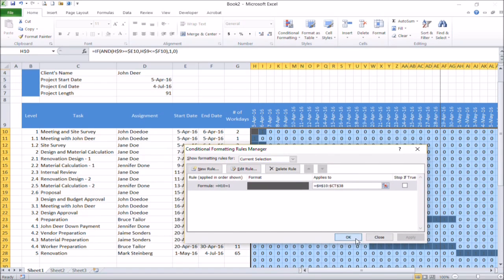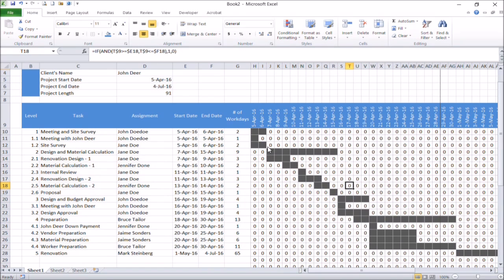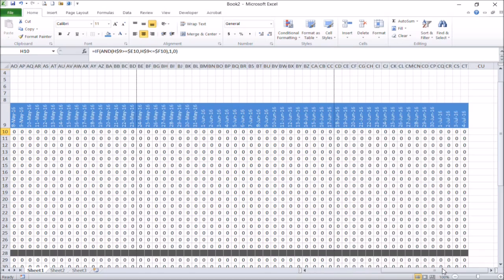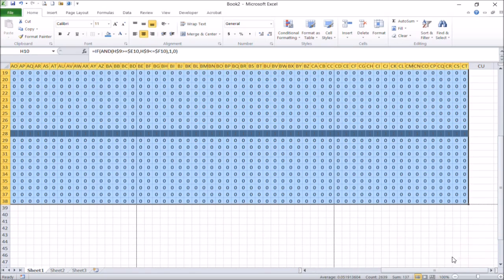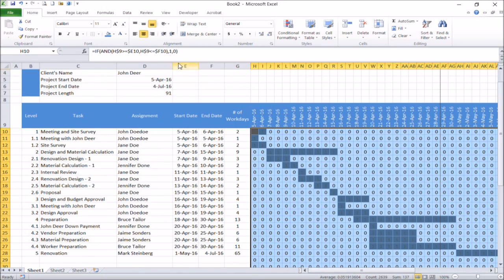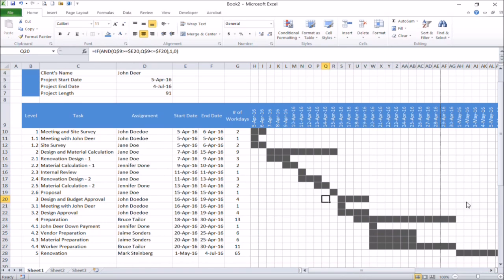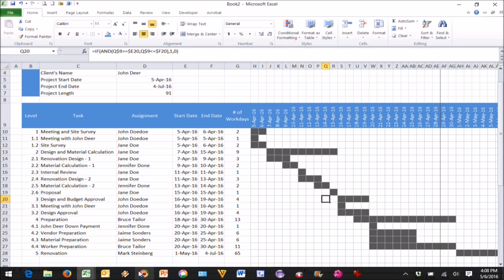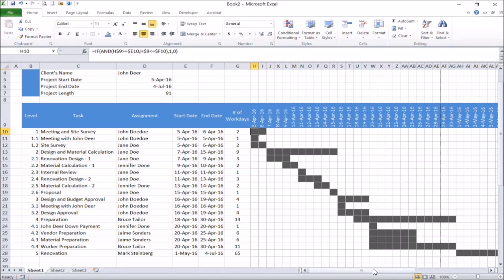You can see the result after you type this formula. You can change font colors of all cells in this dates columns to white now, so you won't see any 0 or 1 value in this column. Your Gantt chart is finished now. If you don't want to add any holiday markers, you can start to prepare it for printing.